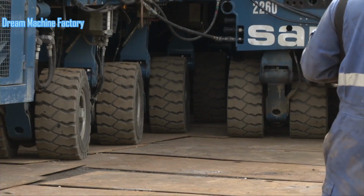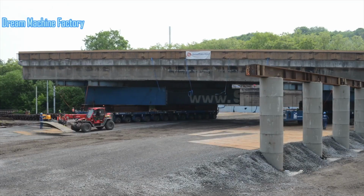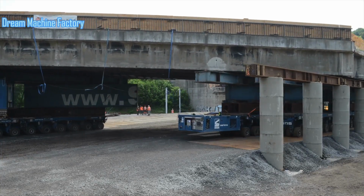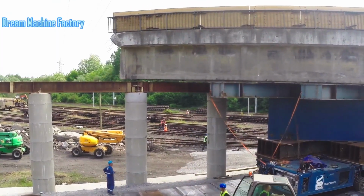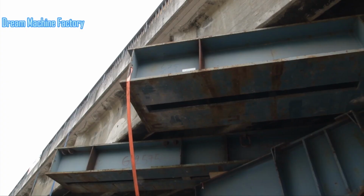The physical relocation of the Rosbruck Bridge was a feat that unfolded over an intense 72-hour period. To initiate this phase, the SNCF line beneath the bridge was closed, and teams began by removing the railway tracks and the overhead electrical cables. This step was essential, not only to allow room for the bridge's relocation, but also to ensure the safety of the underlying rail infrastructure. With these elements removed, workers could proceed with the heavy lifting required to shift the bridge structure from its original position.